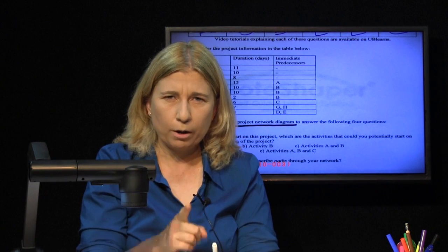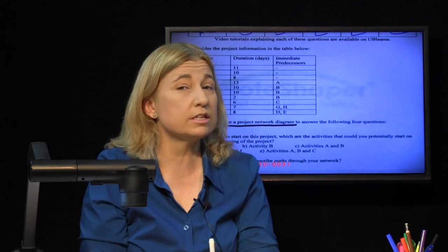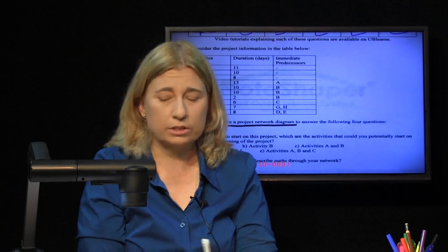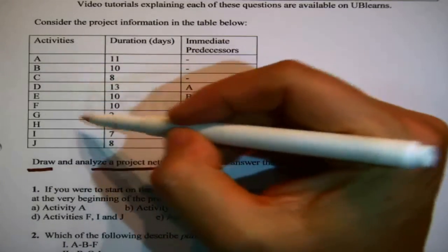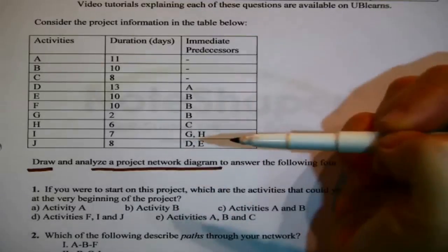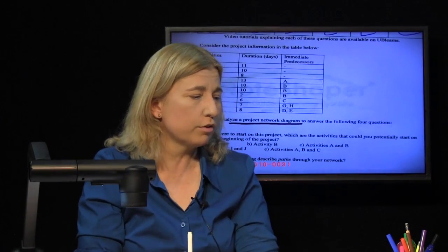Though, remember, from the project management chapter, there were really two different techniques in project management, PERT and CPM. This is a CPM problem. You can tell because there is only one reading for how long each one of the activities is going to take. That tells you it's a CPM problem. Anyway, I digress. We're going to have to draw this network.